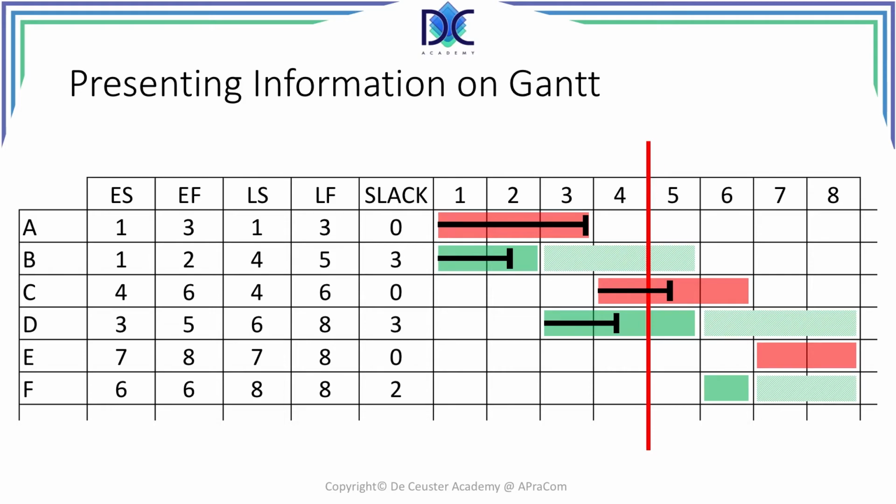We see that activity A has been completed. We don't have information on whether the activity was completed on time or not, but we could find that in the history of the project. We see that activity B should have been completed already a long time ago, but we are only at 2/3 of the activity.